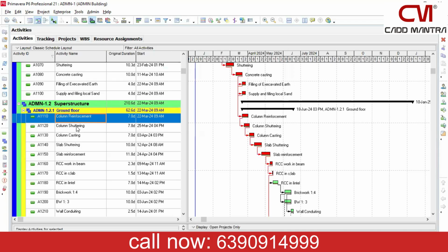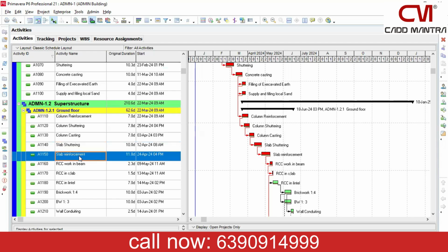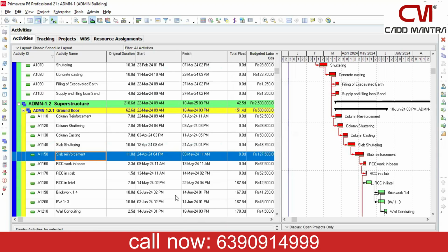So we have certain activities for each work package. You are going to break down those work packages into the list of activities. Now, these are the actual tasks that we are going to do. So first we have a project. We created our work breakdown structure, which is the high-level plan. Then we are going to decompose those work packages into the list of activities, because activity is going to provide the basis for estimation, duration, cost, resources, right?